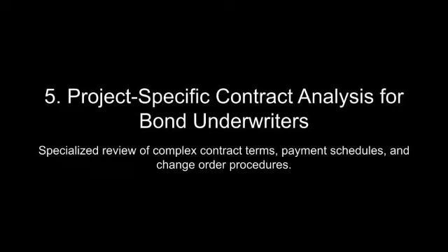Retainage terms, typically holding 5 to 10% of contract value until project completion, serve as a financial safeguard but often become a double-edged sword. While retainage incentivizes contractors to finish projects, it can severely limit their working capital, particularly on large or long-term contracts. Surety underwriters must evaluate whether the retainage amount aligns with the contractor's financial stability and whether excessive withholding could push the contractor into insolvency.